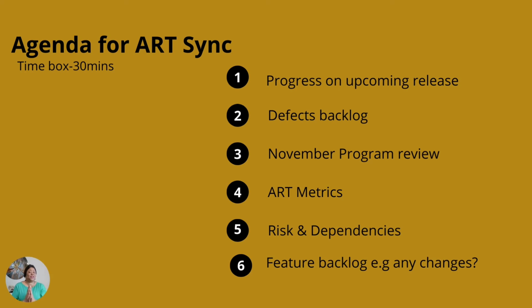And there are times this risk can actually not be mitigated. As the release train engineer, what you should do is you escalate the risk. You let your stakeholders know that, hey, this risk may likely happen, okay, so that everybody is expectant. For transparency's sake, don't forget that Agile is a big fan of transparency. You have to be transparent from the beginning to the end. There are no shady deals here.